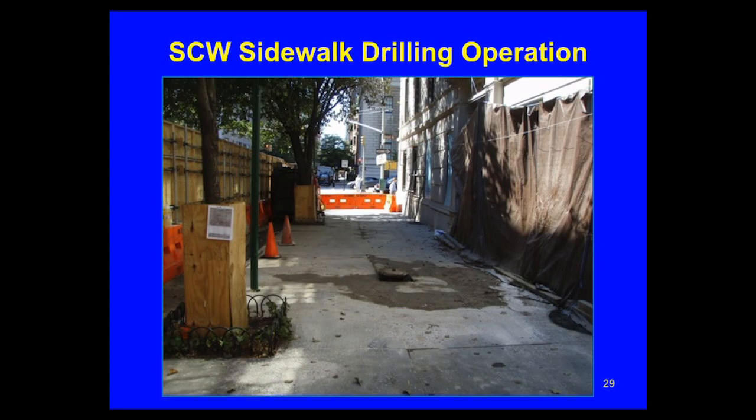So this is what the drill rig was, maybe on the site for 2 to 3 weeks. We did this in the last week in August. When you do projects like this, there are all these constraints, and the building basically says we have a window to build or do renovations.